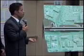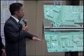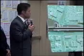So what that's going to allow in the new configuration is we'll cut over earlier, and then run fiber all along this side and tie into the existing. So in answer to your question, what's going to happen when they're trenching out all this fiber? The answer is they're not going to be doing that. They'll abandon that line in place, and they'll just concrete that out. They'll essentially fill it with slurry. So there won't be open cut in that area. What you're going to see is some kind of a mole bore system where they jack and push several hundred feet at a time, all the way until it gets back to where the line runs on that side of the track.